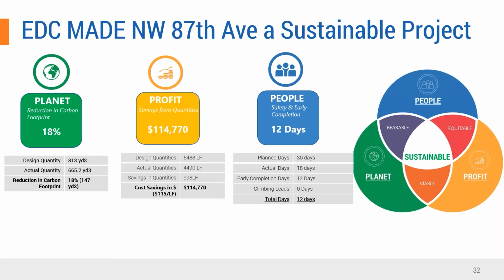So we stuck to that kind of schedule, and then, based on the information we got along the alignment of the entire profile for end bends 1 and 4, we optimized and said, you know what, this is the length you need for intermediate bends 2 and 3, which were inside the canal. And for one of the bends, we drove all 26 piles in a single day.